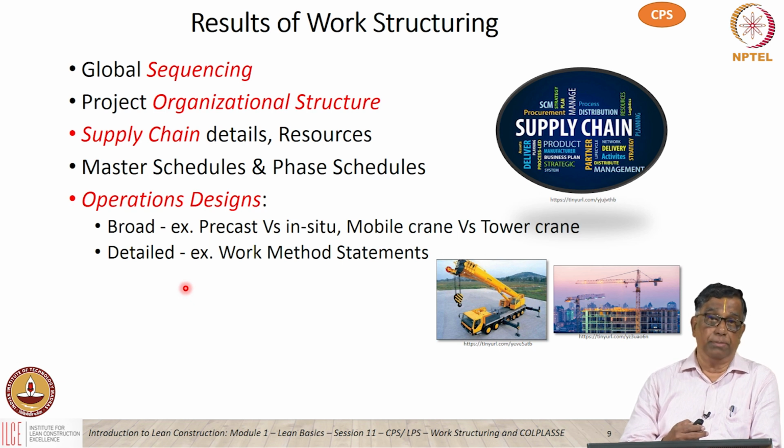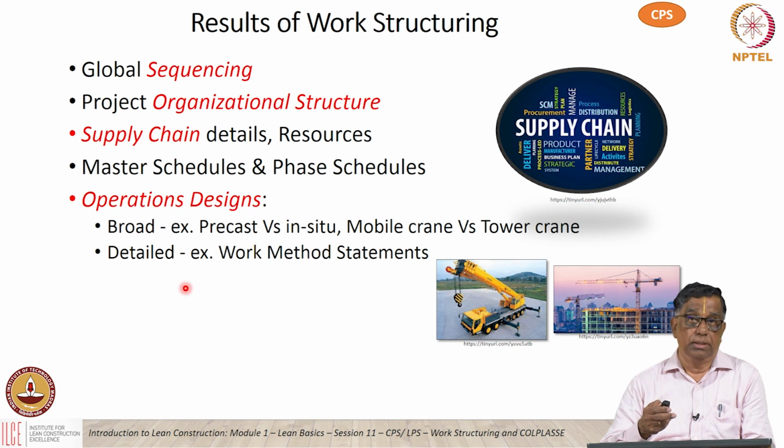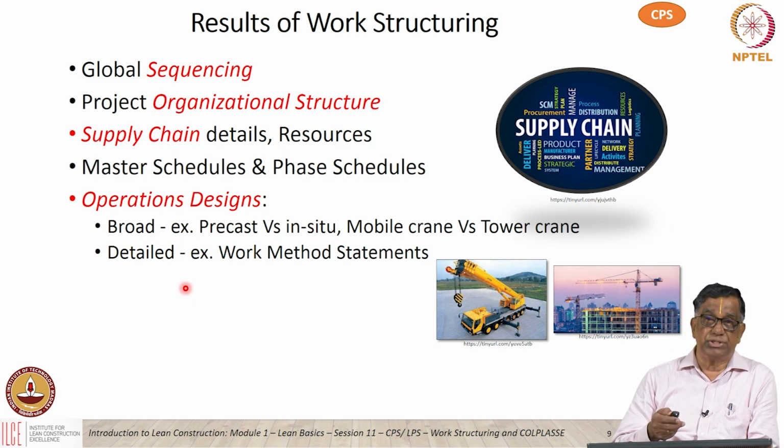That should be like a Bible for the entire work, and no deviation would be permitted. Any self-respecting project management consultant, for example, will not permit any deviation from a written, approved method statement unless it gets reapproved with whatever revisions one has in mind. So we need to look at the work structuring and other systems in construction before embarking upon CPS.